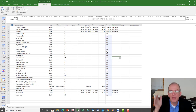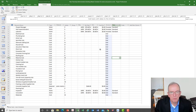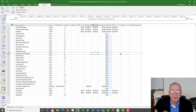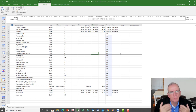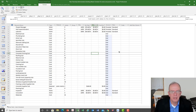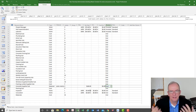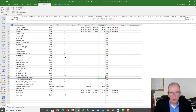How I apply the money in the software tells me approximately when it's going to be paid out. It doesn't adjust for 30-day payment terms, but it gives a good long-term view of how money is flowing out. For something like concrete — whether I set it to start or end of the day, it's largely the same. But for many things, the timing does matter. I could also set certain activities to pay at the start, like concrete delivery.